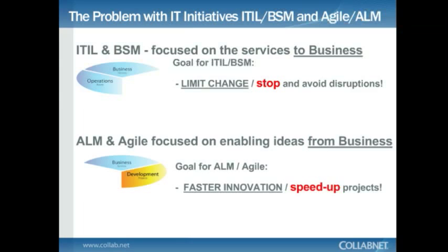Now, between the business and the development teams, there's been this new phenomenon of Agile. This Agile ALM effort is really designed to take development projects from very long windows of development with very complex stacks and to simplify the builds in such a way that those projects can go from concept to release in a very short period of time. In fact, the ideal environment for many of our customers has gone from 2 years to 9 months, down to 90 days, and in some cases we see 60 days, and there are a couple of cases where small composite applications are now being rolled out within 24 hours.